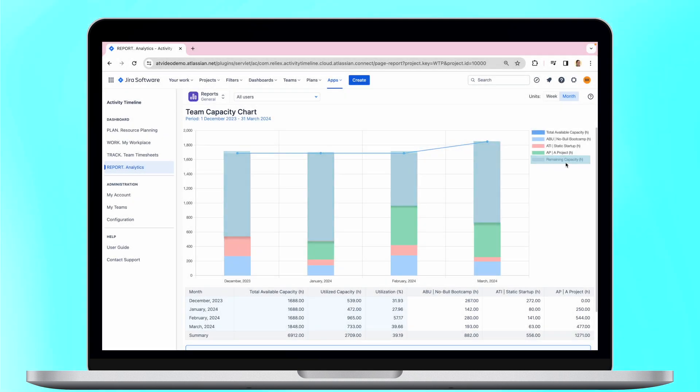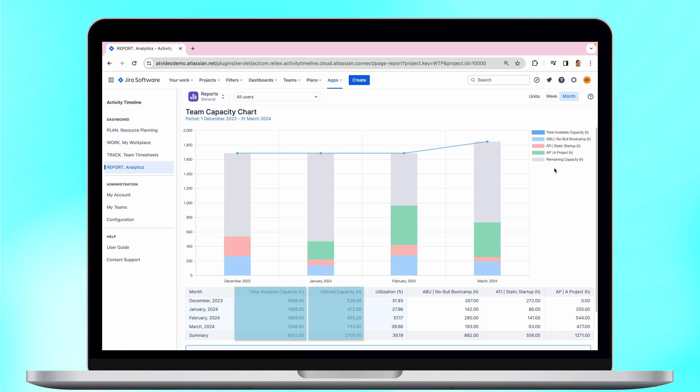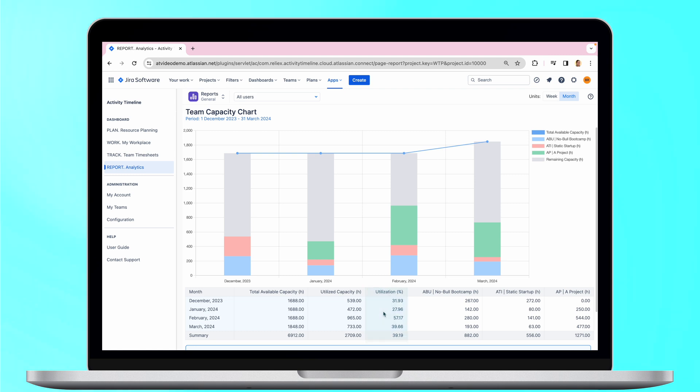The third is Remaining Capacity. This value shows a difference between the total available capacity and what is already planned. The next goes Utilization. It displays in the percentage format how much of the team's capacity has been already planned for the period.